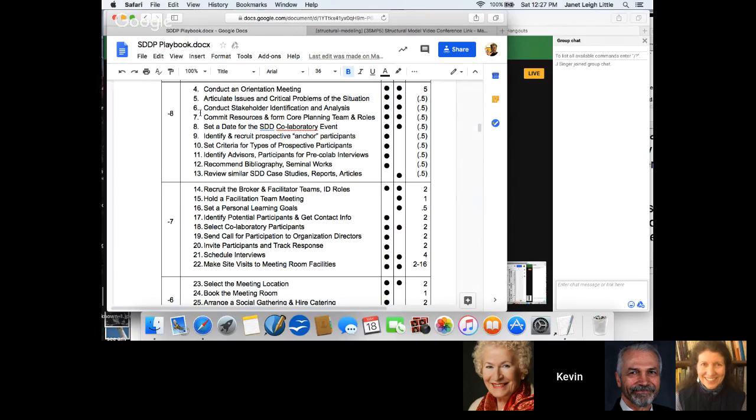And then number 8, the most critical. We found that the most critical action to take to make sure a dialogue happens is to set a date for it. If you don't get a date set, it will float. It can float endlessly, that they keep preparing and preparing and then just run out of steam when we don't get a commitment. So setting a date is critical.